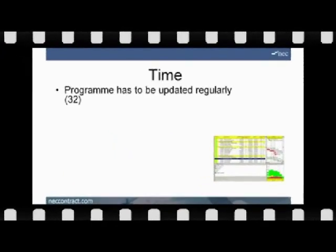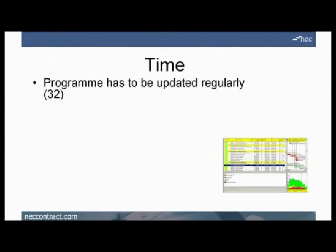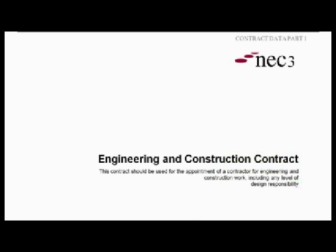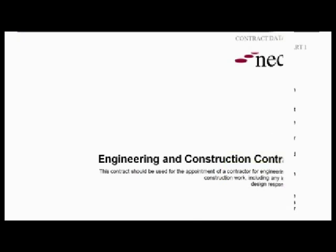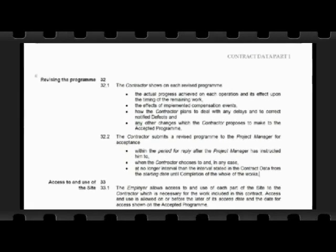Clause 32 deals with revising the programme. The contractor shows on each revised programme a number of things, including the actual progress achieved on each operation and its effects upon the timing of the remaining work.